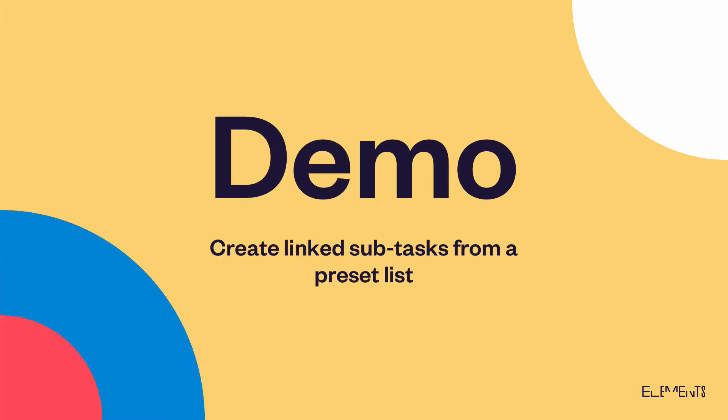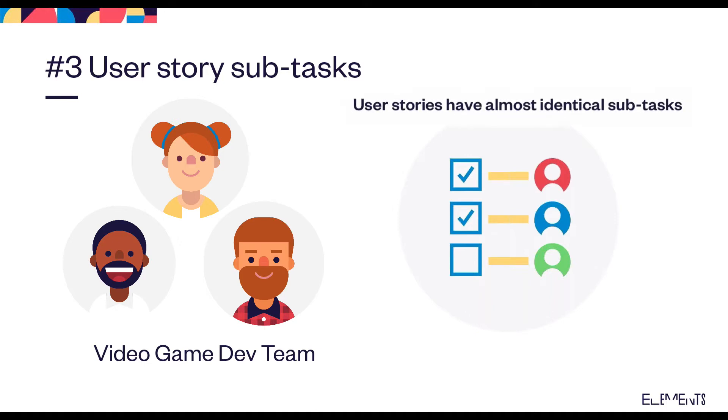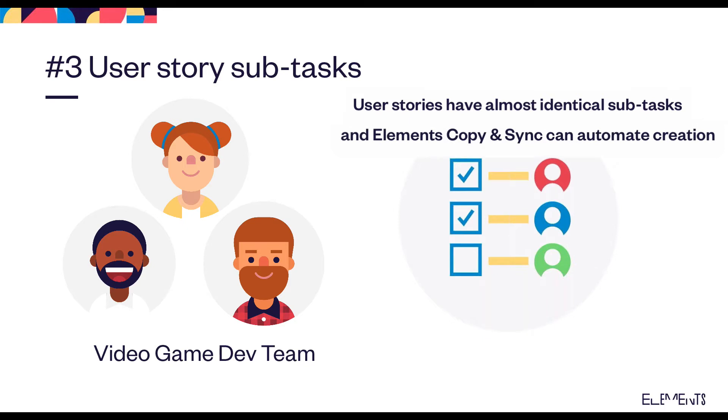We're going to show you how you can create linked subtasks for a user story from a preset list. This use case focuses on a video game dev team, and for each new user story for their video game, they need to create an almost identical series of subtasks, and that's where Elements Copy and Sync can help automate creation of those subtasks.